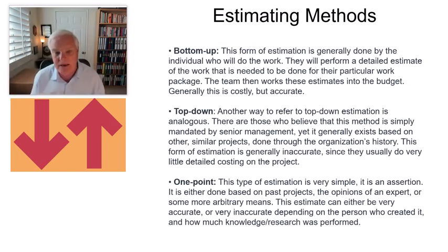That would be like taking a car and starting with the screws and say, how much would that one screw cost? How much would that screw cost? How would that screw that goes into a hinge, goes into a door jamb, into a door. Adding it that way is called bottoms up. You decompose the project by talking about all of the tasks bottoms up.